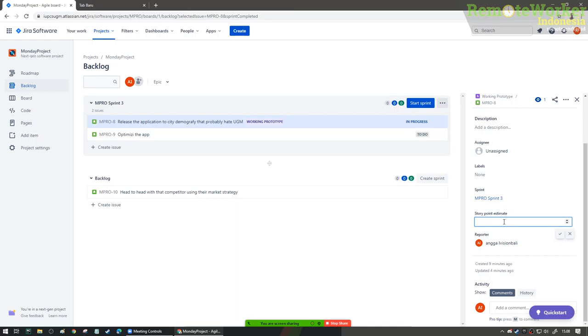So for example, I'm going to say solve A. After the developer works on solve A, it's actually solve A1, A2, A3. So this should be separated into several tasks. That's actually, Mbak Safira, us underestimating. So it should be split into other tasks. But if it really does occur, and the task is actually simple and no hours are logged on it in a good manner, this means the developer is bad. I have a lot of experience in other companies where the company fired that developer because lots of tasks were carried over. Or he often left one task, moved into another task without finishing, into another sprint. That means he is doing it really badly. So that's it. Did that answer your question, Safira?